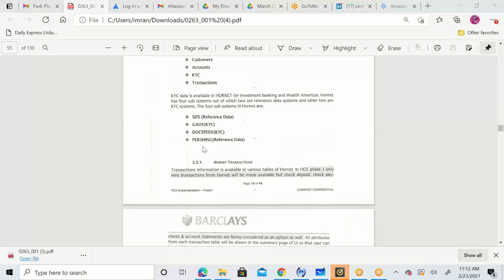And then you go back and forth, you do data workshops, you identify issues related to data, you perform data analysis, and eventually you'll be able to create the mapping document, which is the identification of each data attribute: coming from which database, which table, and how it is stored, what is the format and pattern. We have 2 lectures on that: data analysis and data mapping, and data warehousing. I'm not going to confuse you now, but the idea here is that once you go into the database, you need to find out whatever information your application needs, is that available or not.